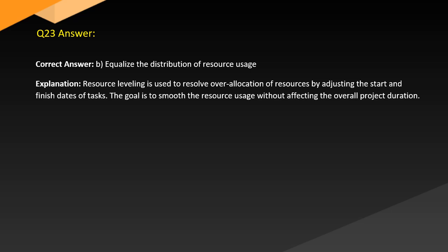Answer. Correct answer B. Equalize the distribution of resource usage. Explanation. Resource leveling is used to resolve overallocation of resources by adjusting the start and finish dates of tasks. The goal is to smooth the resource usage without affecting the overall project duration.